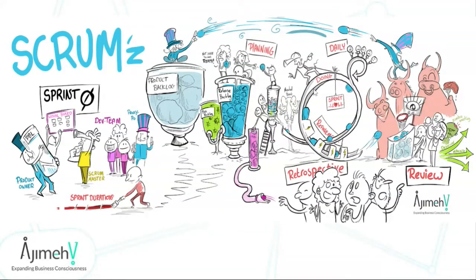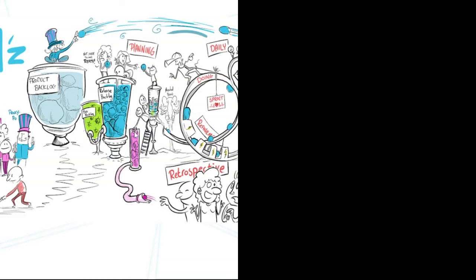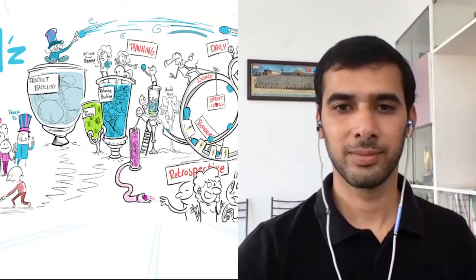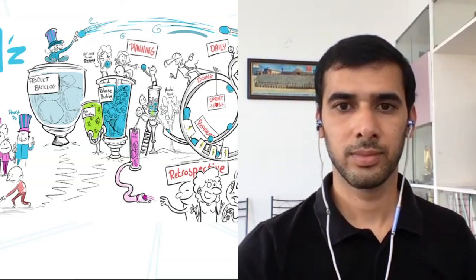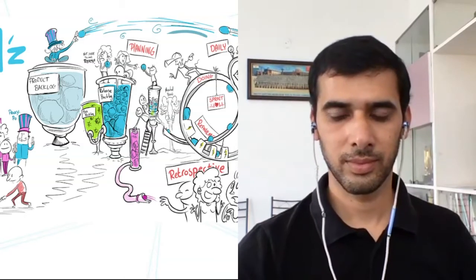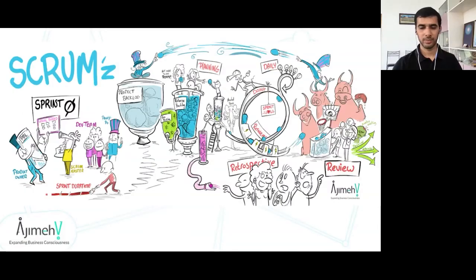The sprint backlog is the commitment for the incoming sprint. We plan sprint number 42, for example, at the end of sprint number 41. We found that people are much more efficient arriving Monday morning already knowing what to do in the sprint, rather than arriving Monday morning and starting to plan.